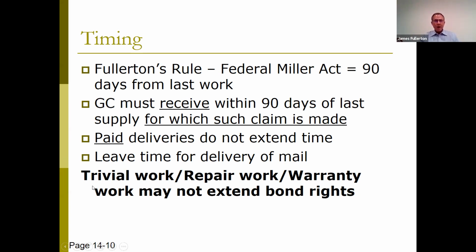Okay, so trivial work, repair work, warranty work may not extend bond rights. I say may. Maybe I should say will not extend bond rights, because that is the clear rule under the Federal Miller Act. There's plenty of Federal Miller Act case law that repair work and warranty work does not extend bond rights. Trivial work's a little bit harder, because if it's new work